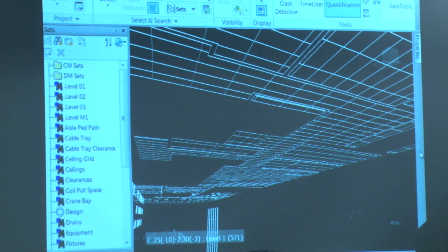You mentioned the hydrology and how this might be used with erosion control, maybe? Yeah. I don't have any examples with me, but we model our excavation, and we model our underground utilities, and we model our shoring. And we've done a lot of work with unsuitable soils. We take the soil report boring logs and we model them on our site, and where the soil types change, we make marks, and then we connect. I talked about how a line is two points, so we draw a line in between those two boring logs where the soils change. And then I talked about how two lines make a surface. We actually create surfaces, and then we can measure volumes between the surfaces and get our soil quantities. We did the Brightwater wastewater treatment plant out in Woodinville, and we did that a lot. We were modeling soil volumes all the time using those kinds of techniques.